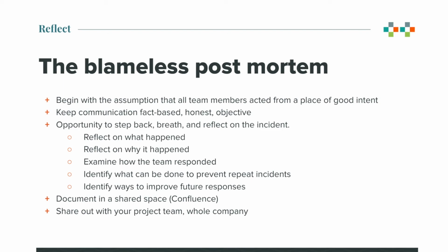The key tenets for any blameless postmortem are to 1, avoid blame, 2, to keep it constructive, 3, to collaborate and share knowledge, and 4th, perhaps the most important, to identify preventative actions. You may learn that your handling of the incident went perfectly. Fantastic. Or you'll likely learn that you're going to need to iterate on your process further. You're going to need to refine your process and iron out the wrinkles. And that's totally okay.